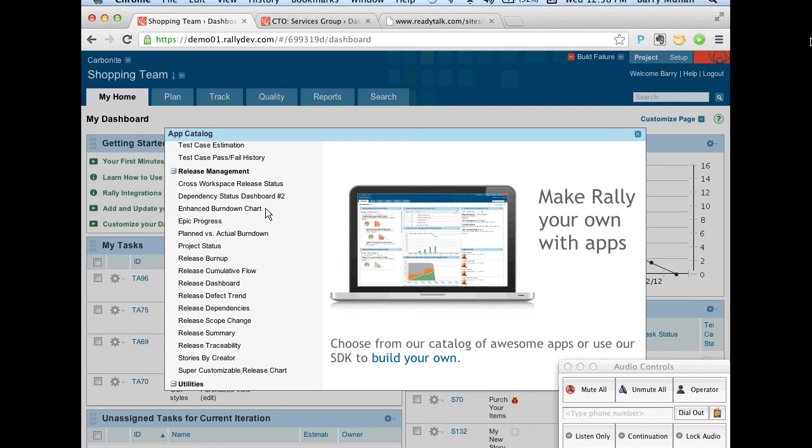Yeah, that's a good point. That's from a planning perspective. What you would see is that your track release status would change based on the operations you make. But in the planning page, it doesn't change, and that's because we're showing you the complete plan for that iteration, which includes things from potentially different releases. So I think Tom made the point to continue to use releases in Rally as that mid-range planning tool to help you do monthly, bi-monthly or quarterly planning. And let's figure out the version issue in another way.